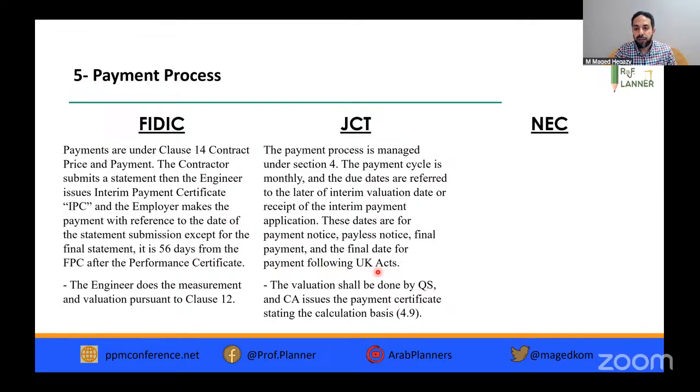We are following the UK Acts here, because GCT is almost like a UK form. It's used in the UK. The valuation shall be done by the quantity surveyor, and the contract administrator issues the payment certificate stating the calculation basis.